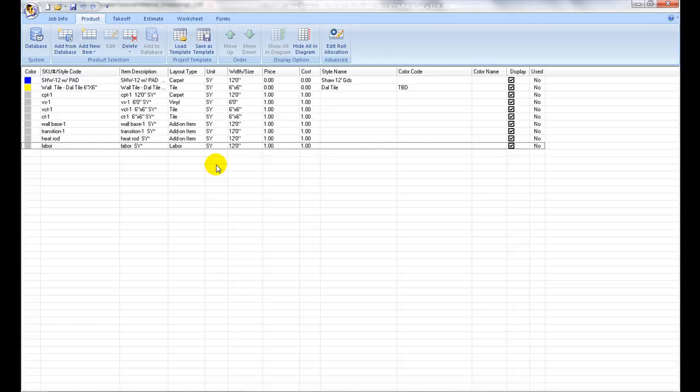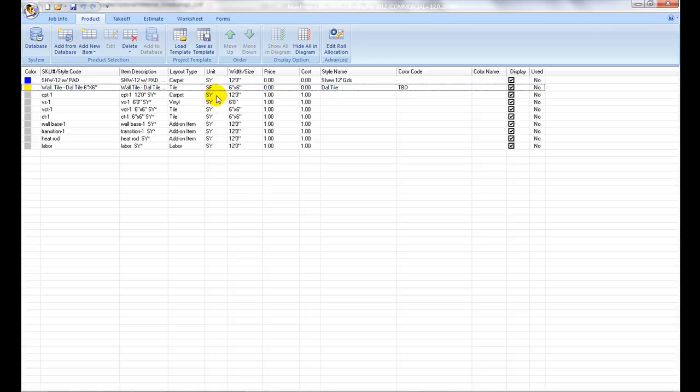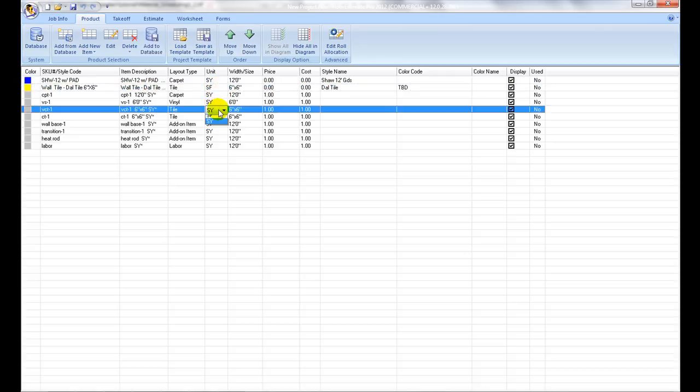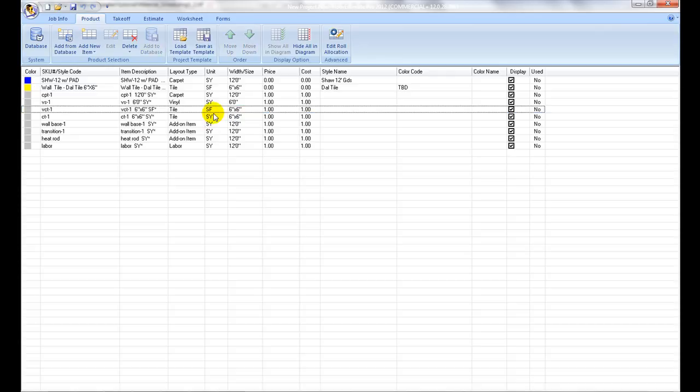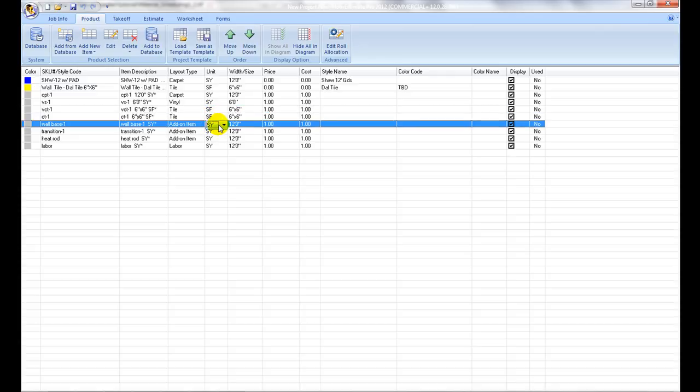Unit Setup: Next proceed to the Unit column. Another key estimating property is the Unit. For area based products select square yard, square foot. For linear products use linear foot. For count items use each. For grout use quart, liter, or pound.